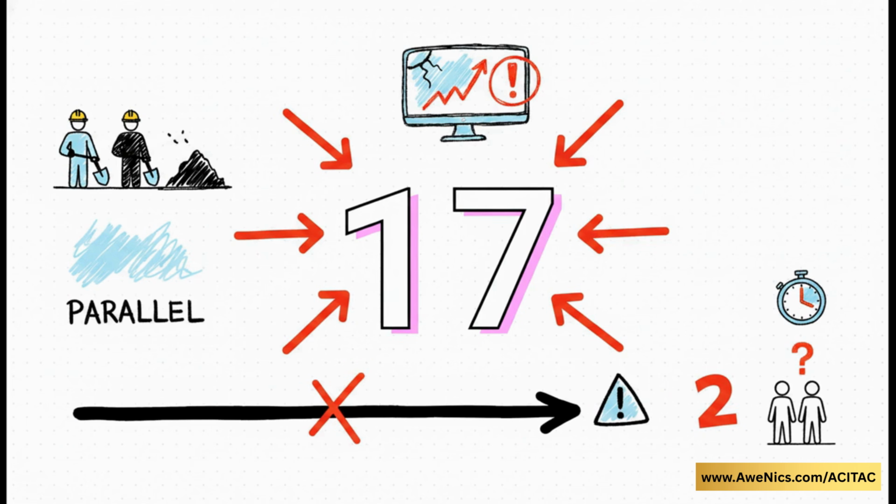But, well, here comes the reality check. 17. For 4 consecutive days in early June, specifically June 1st to June 4th, our project is demanding 17 helpers. Why? Because we've got parallel activities, things like different types of excavation, all happening at the exact same time. So we've crossed that black limit line. The software is now throwing a massive red alert at us, signaling a critical overallocation. We are officially short by 2 helpers for 4 whole days.